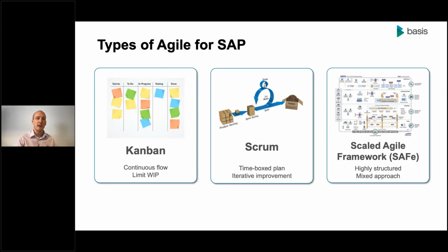So the team there uses Kanban to address that continuous flow of customer support. Whereas for our new feature development, we tend to use Scrum because we can define what work we want to do in the periods associated with Scrum, and we can do that in a slightly more structured way, leading towards our regular product releases.